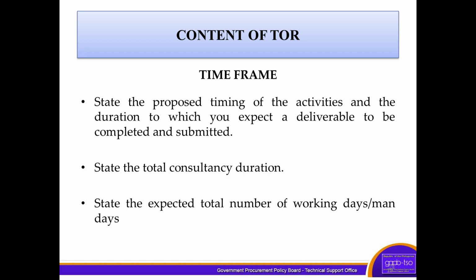So another important content of the TOR is the time frame. It states the proposed timing of the activities and the duration within which you expect a deliverable to be completed and submitted. And then state the total consultancy duration, and the expected total number of working days or man-days.